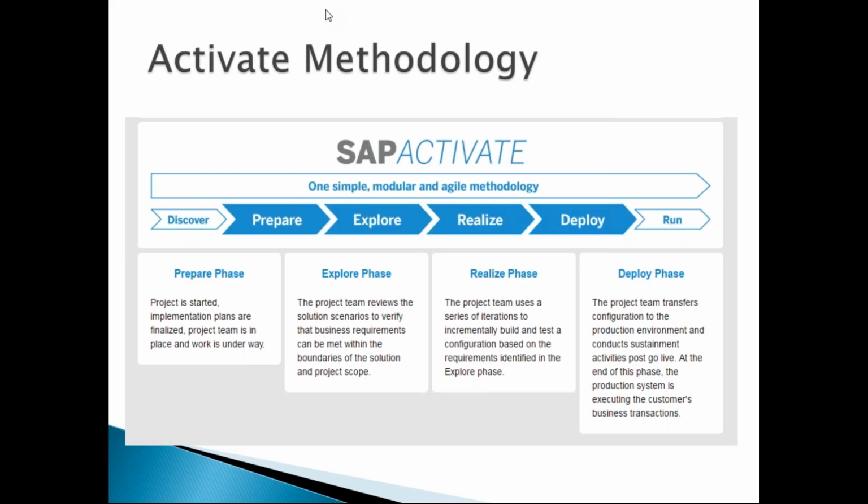So instead of that, here in the agile process, we divide the timeline into different parts. So if you are given around 20 weeks of time, you can first start your configurations and work for initial, say 5 weeks. So first 5 weeks you work on the configurations, and then you go in front of the customer with around 30% or 40% of the product that has been configured. Initial 5 weeks, for example, just 30%.